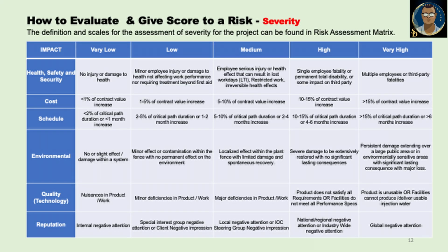How to evaluate and give a score to the risk. I will not read the whole table. You can stop the slide and take a screenshot if you need a reference. So you can see the impact, very low. For an example, let's discuss quality. Very low is nuisances in the project or work. Then medium is major deficiencies for the project and work.